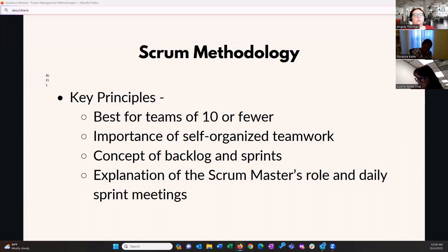The tasks within the project are put into a backlog at the beginning and then split into sprints, where the work is divided into short sections. Usually the sprint has a duration of no more than a month, most frequently only 2 weeks.